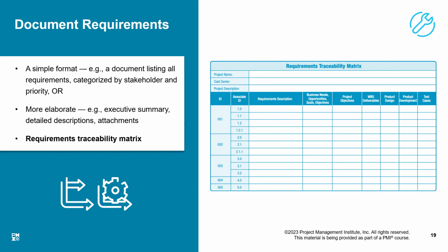Maybe at a later stage, we find that the stakeholder who requested this requirement is no more a stakeholder. So we can check whether, even without that stakeholder, that requirement still remains valid, or it is no more required by other stakeholders. That might be one reason why this requirement should be excluded from the list of the requirements.